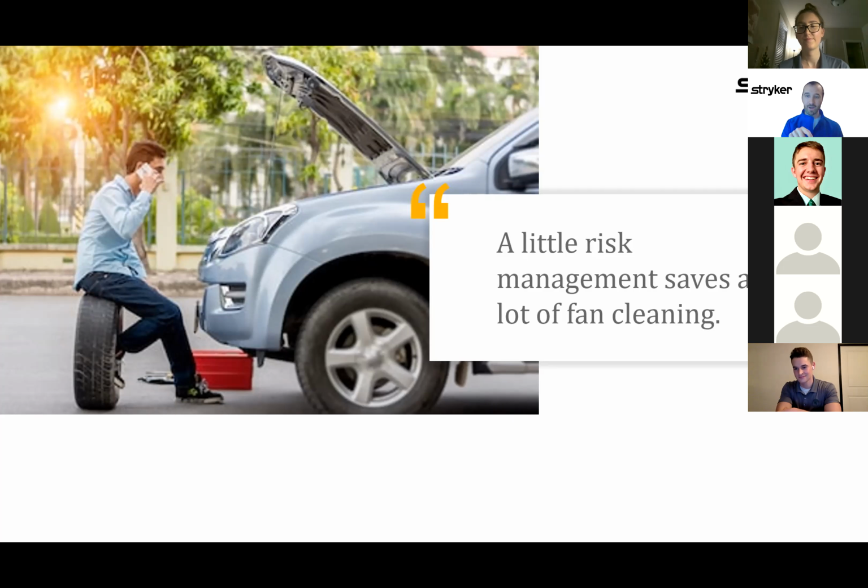So let's talk about that car example, right? The harm is huge, right? I could be days late for this exam if I hit a car, but the occurrence is so low that you're like, I'm willing to take that risk. Me sleeping in, right? The harm might be a little less. I'll have 10 minutes less on my exam, but the likelihood is kind of high, knowing that I hate alarms. So you say, ooh, this one is in the high region. This is a high. I need to address this as early as possible. I need to address this way before it comes to fruition.